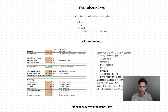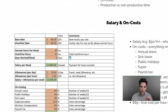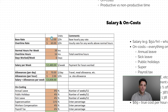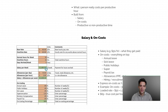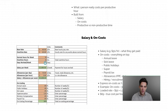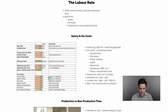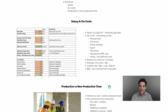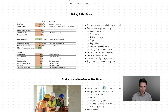In the calculation spreadsheet, this is based on 38 hours per week. You also have to factor in the working week — are they working purely normal time or doing some overtime? I like to work out the salary per week and then divide it by the number of hours they're working. If they're at work 60 hours a week, are they actually doing productive work that entire time? The answer is no — they have pre-starts, toolbox talks, morning tea, lunch breaks, walking to and from site, packing up equipment, getting set up for tasks, and moving between tasks.